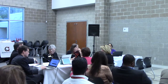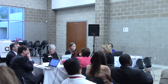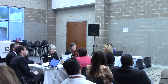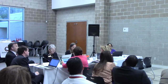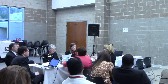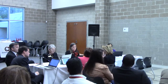That's why we list that. And when would we have that dialogue? It would take a year or two to get that. I'm assuming for an addition, to your point, it takes 6 months just to get through a planning process to be able to break ground. What is our lead time of having to have that conversation? Well, the peak is a few years down the road.